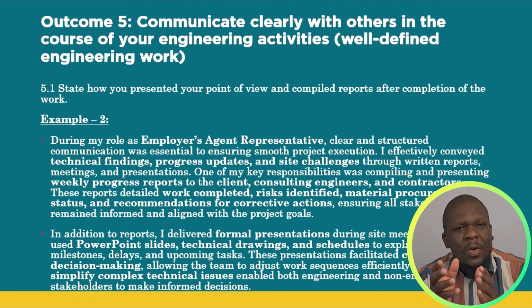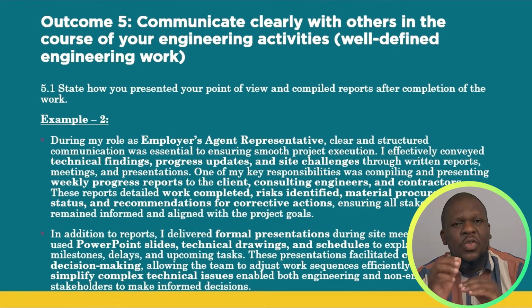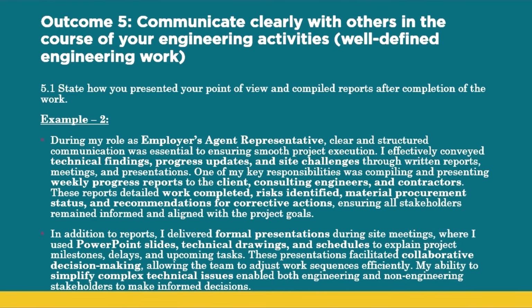During my role as an employer's agent representative, clear and structured communication was essential to ensure smooth project execution. I effectively conveyed technical findings, progress updates, and site challenges through written reports, meetings, and presentations. One of my key responsibilities was compiling and presenting weekly progress reports to the client, consulting engineers, and contractor. These reports detailed work completed, risks identified, material procurement status, and recommendations for corrective actions, ensuring that all stakeholders were informed and aligned to the project goals.